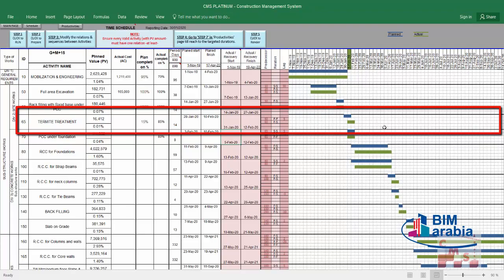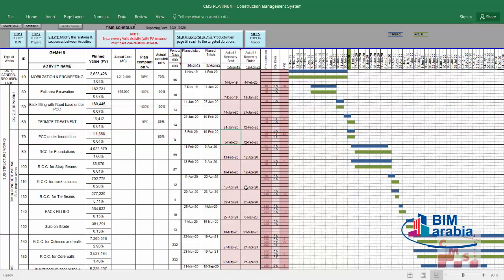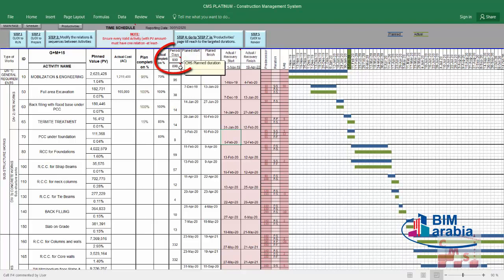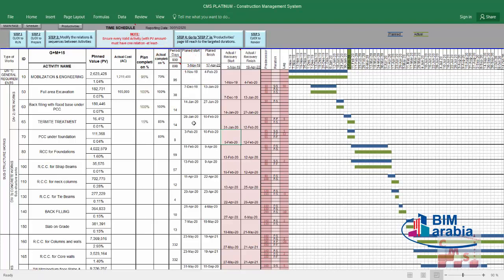After inserting the CMS password, we find the Gantt chart has changed: the blue bar is the plan and the green bar is the actual. The green Gantt chart has updated with a new date. We can see there are two days of delay so far, and the actual duration has changed from 898 to 900 days. The anti-termite work started on 31st instead of 28th, and PCC started on 5th February instead of 3rd February, confirming delays in the actual time schedule.